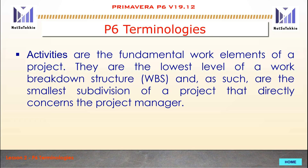Activities are the fundamental work elements of a project. They are the lowest level of a Work Breakdown Structure, and as such are the smallest subdivision of a project that directly concerns the project manager. For example, under Earthworks, the lowest level of activities would be Excavation, Filling, and Rubble Bedding. For Structural Works, the activities would be Formwork Fabrication, Steel Fabrication, Steel Installation, Concrete Pouring, etc.